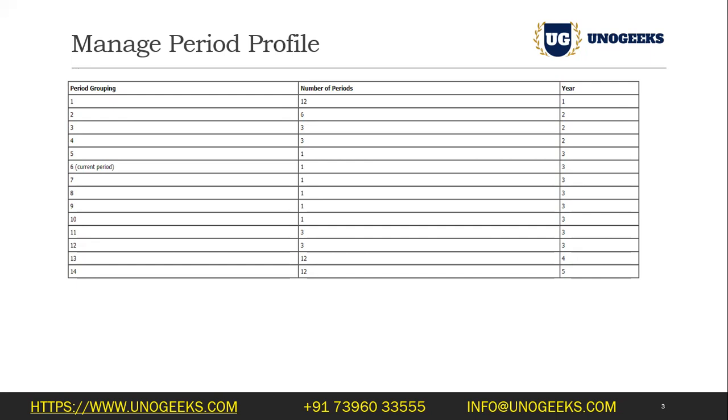No. See, invoicing, you can, now you gave the example of event, right? That is a very basic way of creating the invoice. You can create the invoice based on the cost you have captured. Now you have captured $100 for a particular employee. Now you have applied a burden on that and it comes to 130. Now your burdened cost is 130. Based on this cost, you want to generate the invoice. You can do that. You can use a different invoice method.